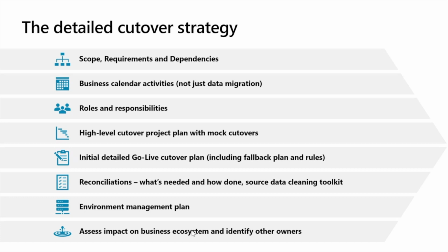You'd be defining what reconciliations you're going to need to do, how you're going to make sure that the data that's come over from the current legacy systems over to Dynamics is accurate and fit for use in the new system. You'll have some definition of an environment management plan. What environments would you need to move the data into? Where are you going to do your validations? Where are you going to do your performance testing?